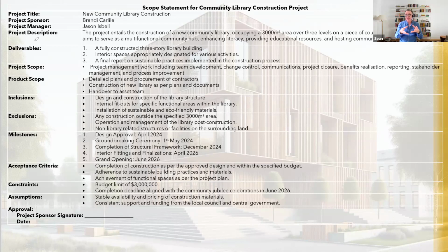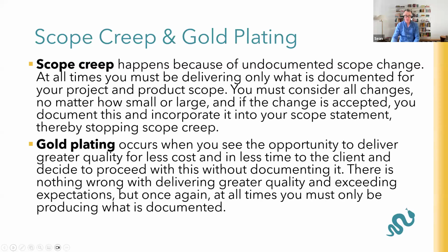And I got the BA who was reporting to me to go buy an actual rubber stamp with red ink and wander around both companies and ask if anybody had anything printed out. And if they did, it got stamped with superseded straight away. So look, version control is really important. But as I said, this is a generic description of what a scope statement should look like and the sorts of categories of information that you should have in it.